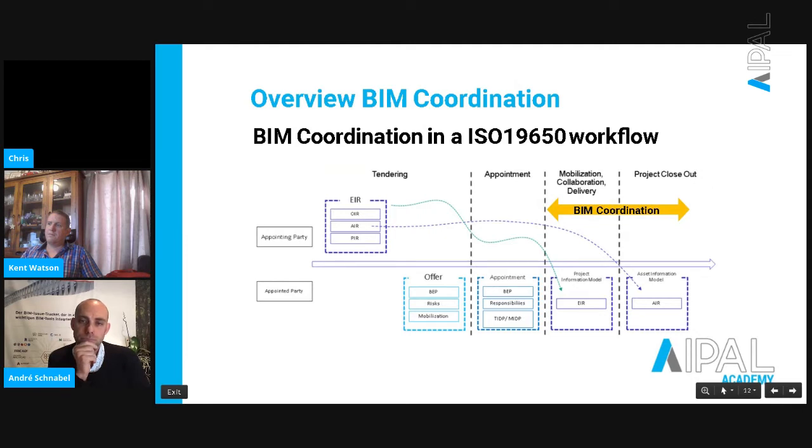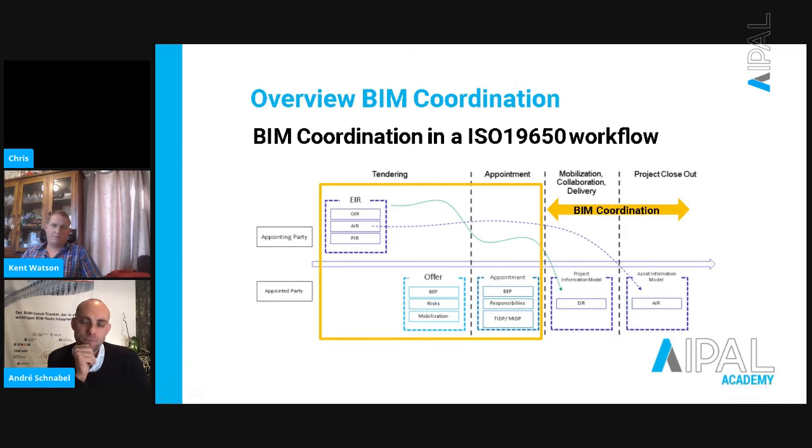But what I think is important, and André, you mentioned it a bit, it is really important to get the rules right, to really set out a good foundation for the BIM coordination. Everything here on the left, all the documents, especially from the appointing party, make clear what you expect in the model, or what you expect the appointed party to deliver. And all of these documents can contribute to the BIM coordination, not only the BIM execution plan, also mobilization plans, responsibility, delivery plans. It is all part, in my opinion, of BIM coordination. Would you agree with that?